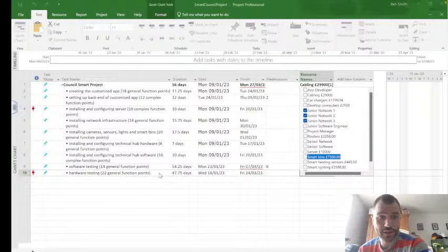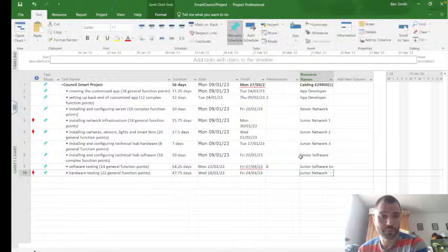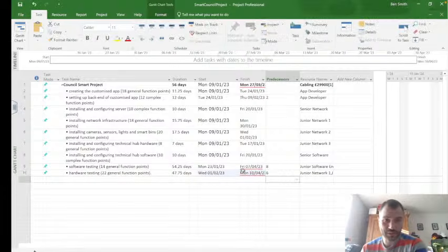So we can split this big 47-day task down a bit. But we can't put them onto it until they've finished row 6. So if you put 6 in there, that will start when they've all finished.